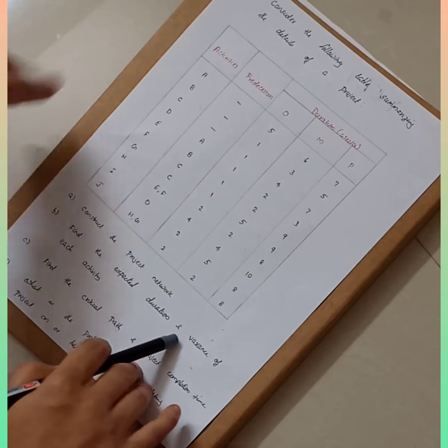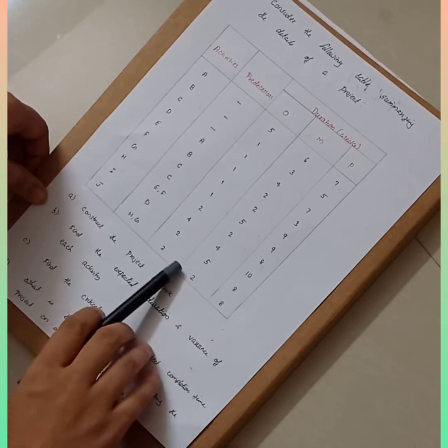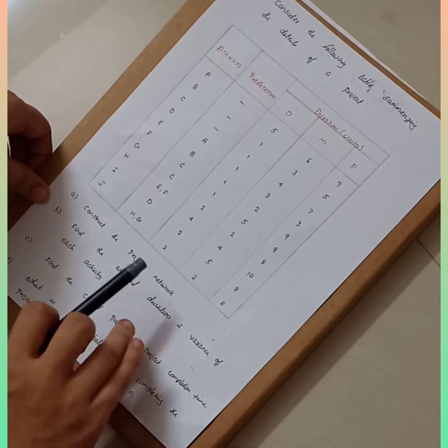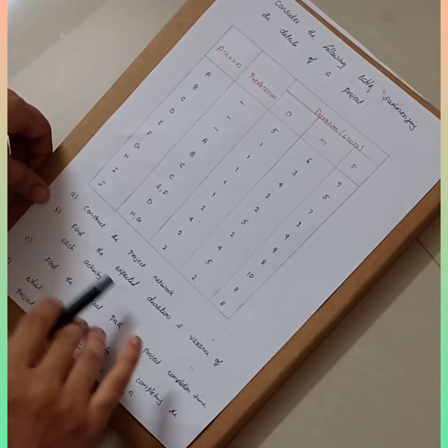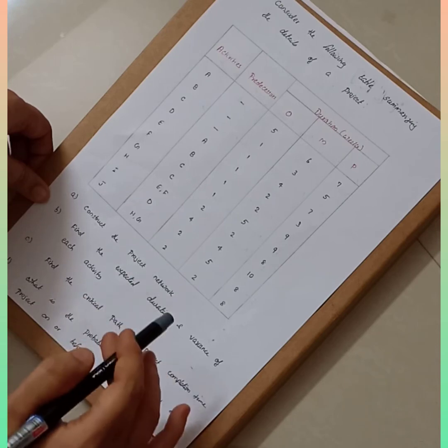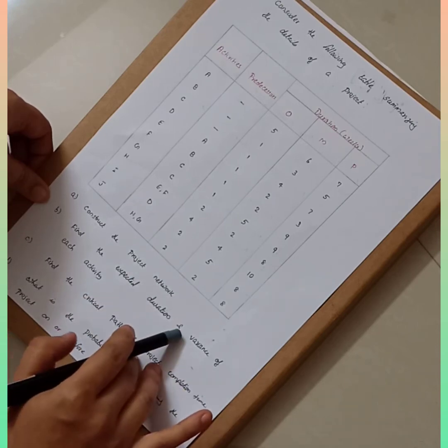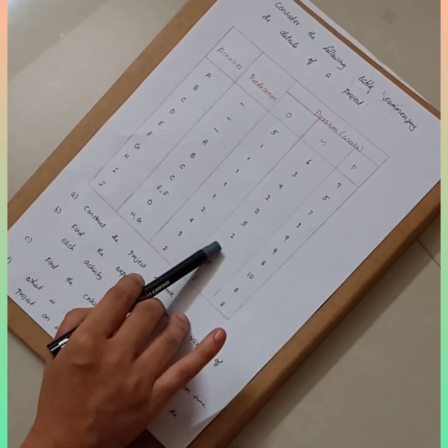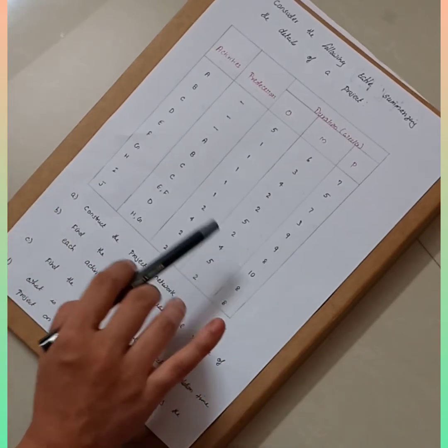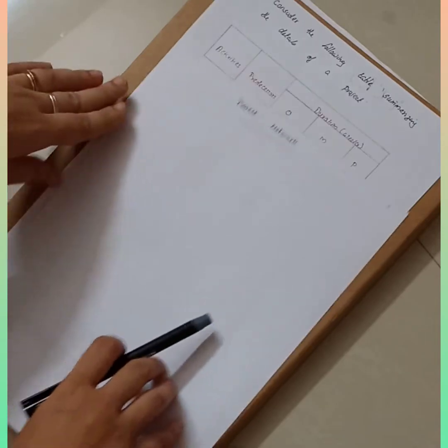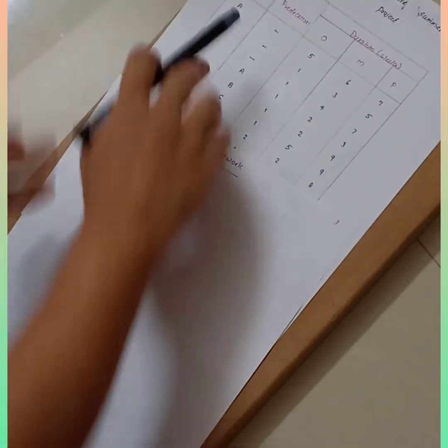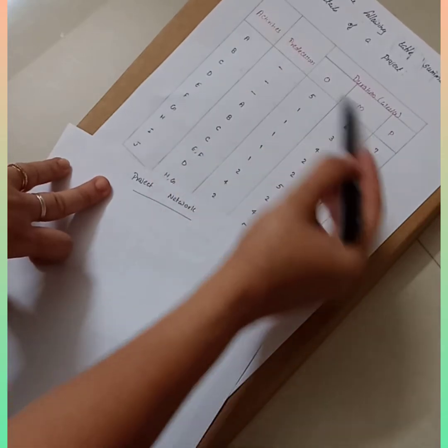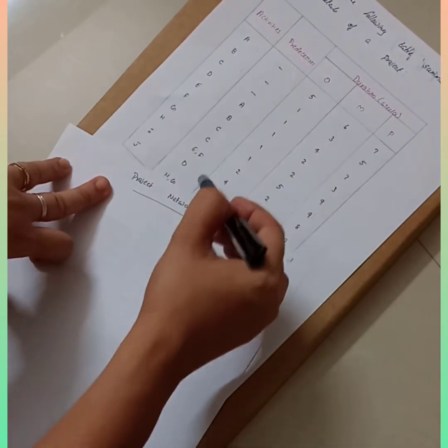Now the first thing that we need to do is draw a network diagram. Only if we draw a network diagram will we be able to proceed with the question. Whether it is for PERT or for CPM, the first step is to draw a network diagram using the given data. So first let's draw a network diagram using this particular data. What is given in the question? You have activities from A to J. Their duration is also given. Then the predecessors are also given.